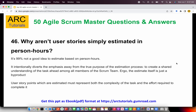Why aren't user stories simply estimated in person hours? This is an extremely important question to see your real understanding of whether you've actually worked on a scrum team. 99% of the time, it is not a good idea to estimate based on person hours. For example, if you have five development team members working one sprint — two weeks, ten working days, eight hours each — you have 40 person hours available. But essentially, it's not a good idea to go with person hours because some stories may span much longer than expected.